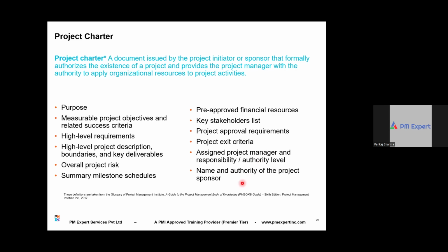It's a high-level plan, right? Now, this project charter is a foundation for planning. Please don't execute the project based on the project charter. It is simply a foundation for planning, right? The roadmap for execution of the project is the project management plan, or a project plan that we'll see shortly.